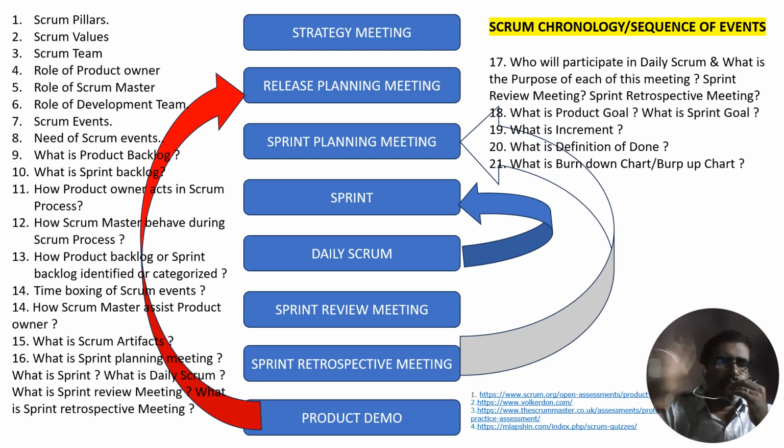If the work turns out to be different, then they need to collaborate with the product owner to negotiate the scope of the sprint backlog within the sprint without affecting the sprint goal. That is very, very important. So the developers need to coordinate with the product owner.